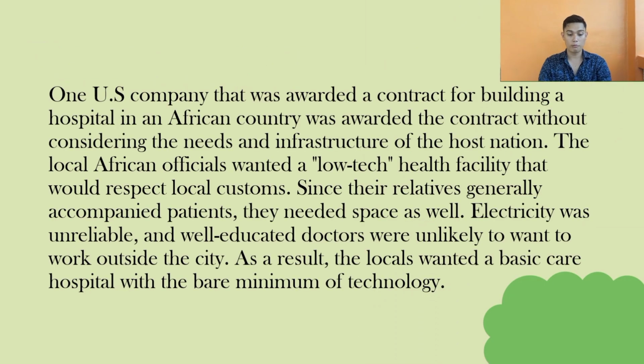So, one US company that was awarded a contract for building a hospital in an African country was awarded the contract without considering the needs and infrastructure of the host nation. The local African officials wanted a low-tech health facility that would respect local customs. Since their relatives generally accompanied patients, they need space as well. Electricity was unreliable, and well-educated doctors were unlikely to want to work outside the city. As a result, the locals wanted a basic care hospital with the bare minimum of technology.